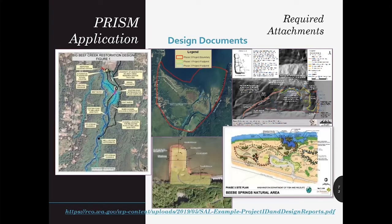Attaching all supporting documents such as maps, assessments, designs, and design reports from a previous phase is very important. If not all of it pertains to this application or phase of the project, highlight what does. This helps provide context and understanding of goals, objectives, and design considerations to the reviewers, and is especially helpful if this application is part of a large multi-phase restoration or acquisition project. For very conceptual projects, include sketches, examples, or photos from other projects to help convey your intent to both technical and citizen reviewers. If you're applying for greater than $250,000 in restoration funding, RCO requires a preliminary design as an application deliverable — this includes engineered plan drawings and a design report. Please see Manual 18 Appendix D for details on what is required.